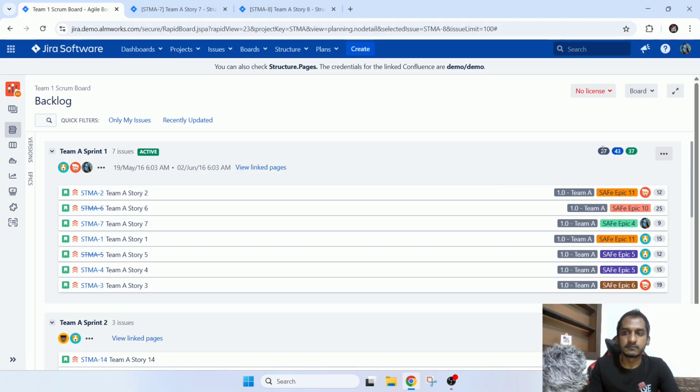At the beginning, maybe you can have a baseline value, let's say, for each sprint 10 story points for each member. Then 6 members means 60 story points for the whole sprint for the Scrum team. Then when it is exceeding 60, you can drop tickets. Likewise, you can work. But later, when you have worked a couple of PIs, you can check your reports and see the history, and then you can get the actual numbers, how much capacity your team has.